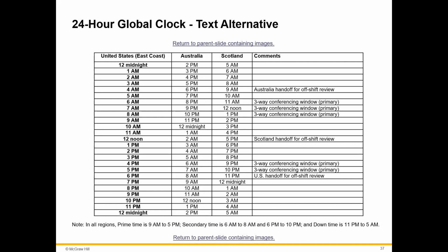And mind you, we are basically two different companies. We are a company that uses a source of service from a Chinese manufacturer. So we need to talk together here. I realized that the first 3 projects were not very good. It was a problem. So we had to look at exactly what we needed to do to fix it. And we decided that every 45 days, we would sit together and jot down our purchase order so that we can do it correctly.